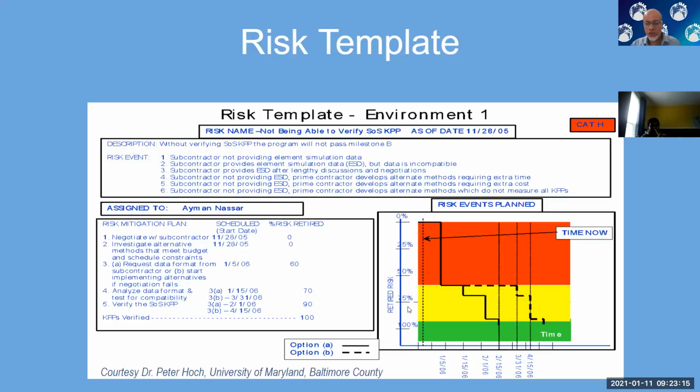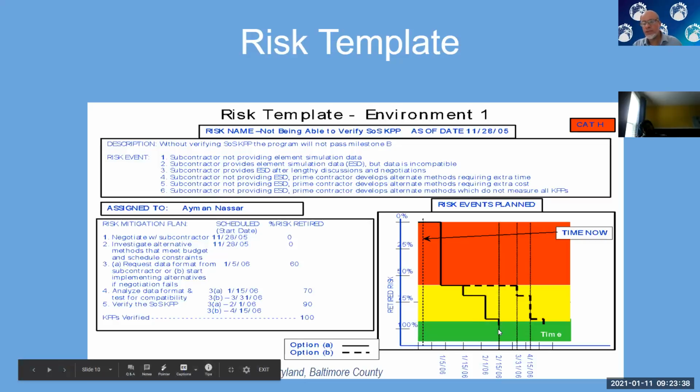So as you start the activity, your risk is 0% mitigated or retired. You have the full risk that could potentially happen. But now we had 2 people review the phone number, it dropped some percentage, 50%, whatever it is. Now I did step number 2, it dropped even further. I did step number 3, it dropped further until it gets into the green. And at that point, you don't need to worry about your risk anymore.